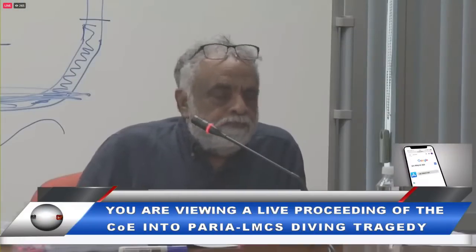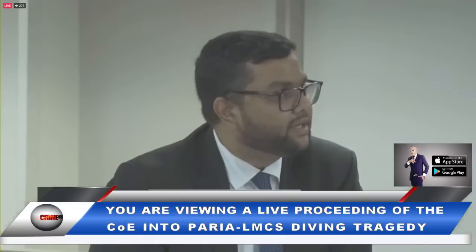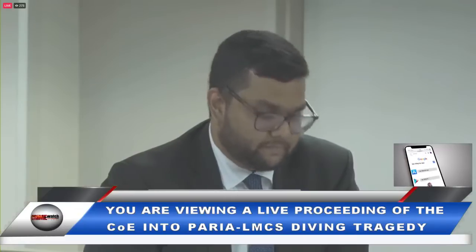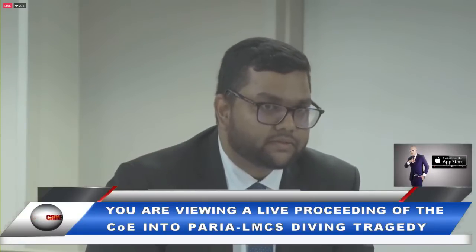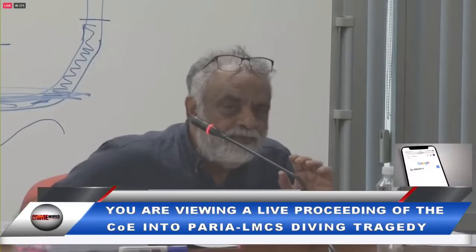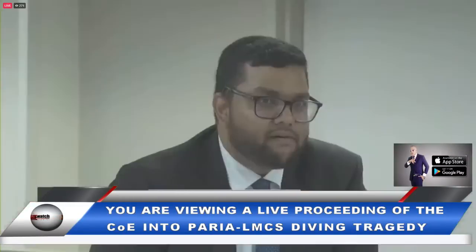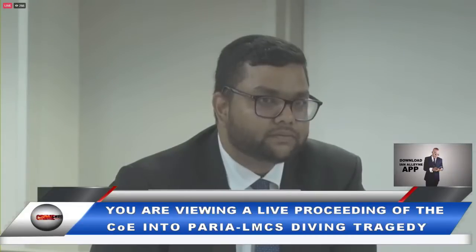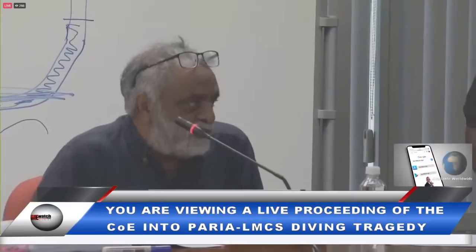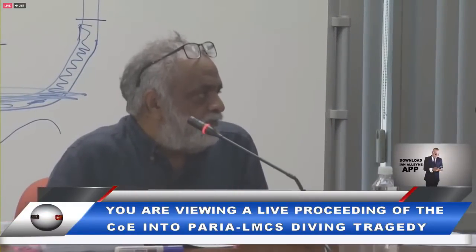All right. So why is it that the pressure testing set out at paragraph 8.4 was not conducted? And you can go ahead and answer that. Sorry, I'm asking why the pressure testing at paragraph 8.4 was not conducted. What? Not conducted. The pipe was egg-shaped, so the rig for testing the weld couldn't be installed.